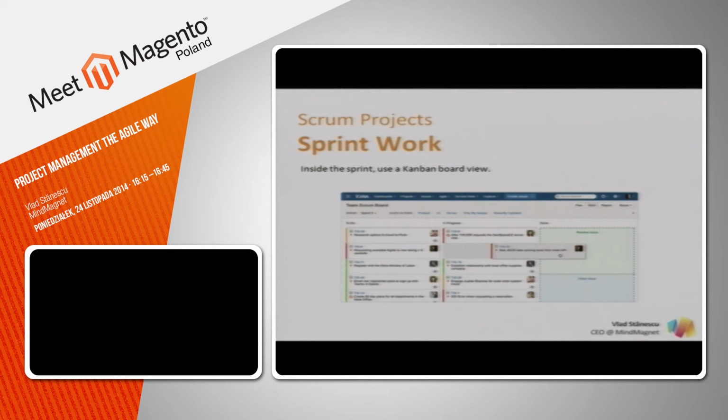We use JIRA inside the sprint, so after the project is broken up into epics and stories, the developers use this Kanban view, where they drag their tasks and stories from to-do into in progress, and finally when they complete it, they drag it into done. The priority on this is to focus on the tasks that are done.